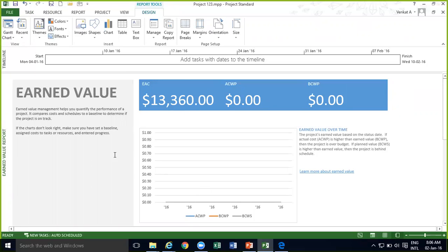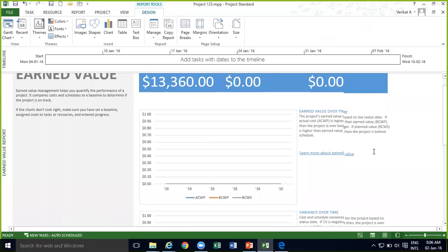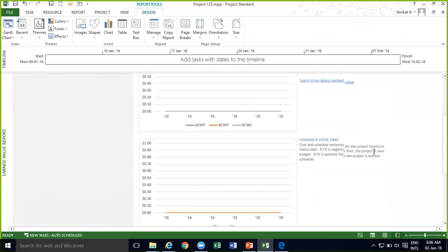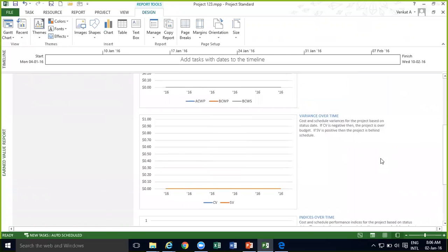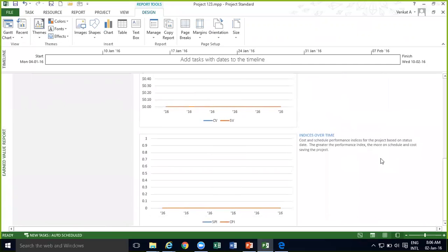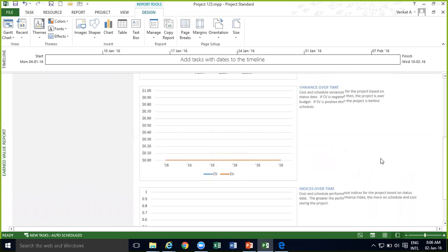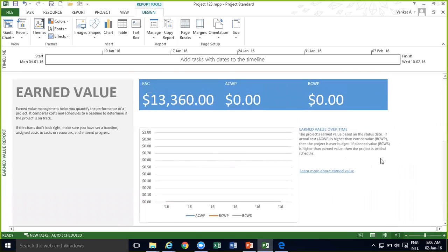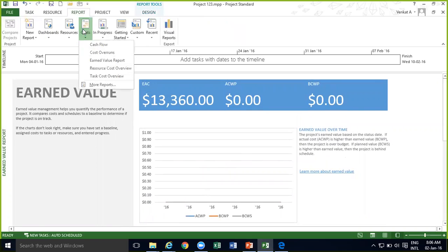Okay, and so EAC is basically estimated completion, and BAC is budgeted completion. So BAC will be the initial budget. Estimated completion would be what changes as you keep on changing the project. The budget will change, right? Initially, you'll have planned maybe 12,000 dollars for this. Then, as the project keeps changing, it may become 13,000, 14,000. So that will become the EAC. Okay.